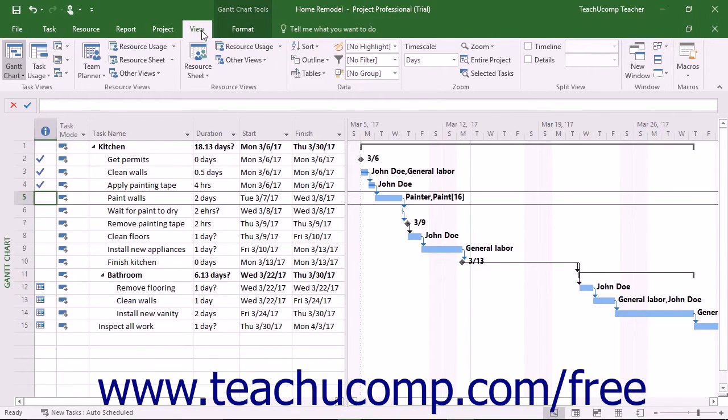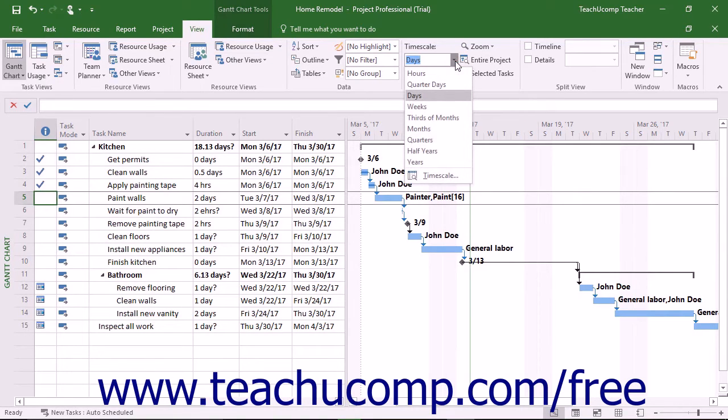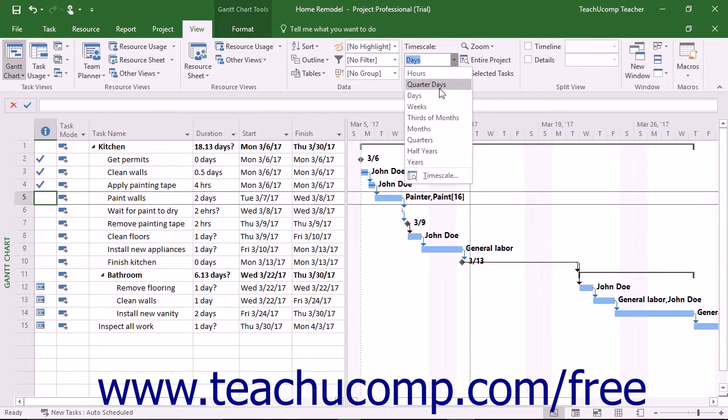To do this, click the View tab in the ribbon, and then click the Time Scale drop-down button in the Zoom button group. You can then easily select a different time scale from the increment shown in the drop-down menu.